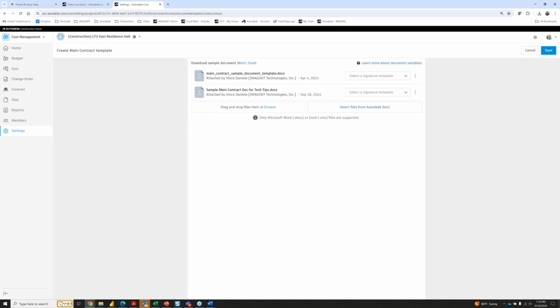So it removed the amounts in the SOVs and just had percentages that they could distribute to their general contractor for sign off. You can edit and create different document templates and store them within the same spot. And then when you go to create them against the payment application, you would have two there to choose from. You can generate both of them and just make sure that you only send off the appropriate one to the owner with the values, one to the general contractor without.